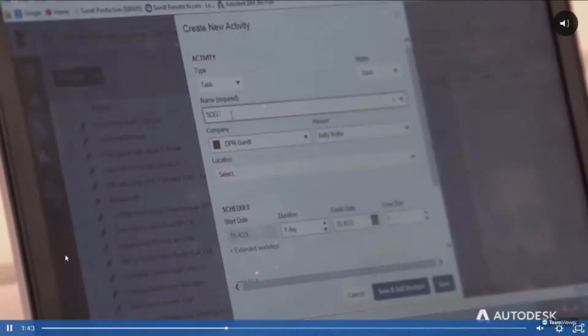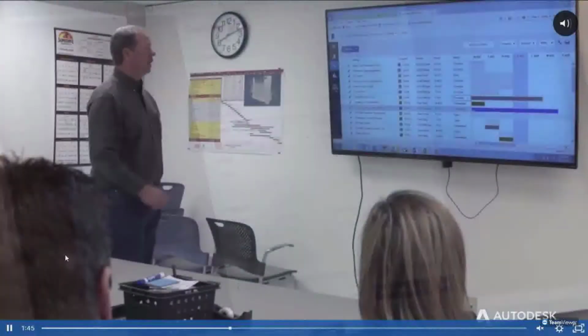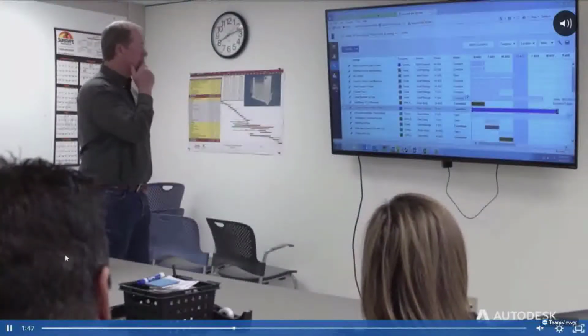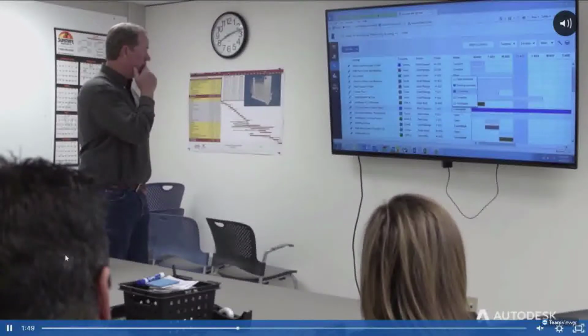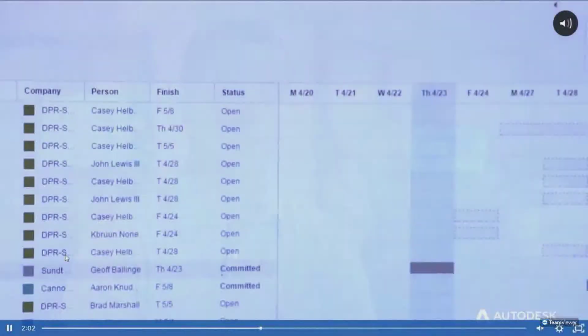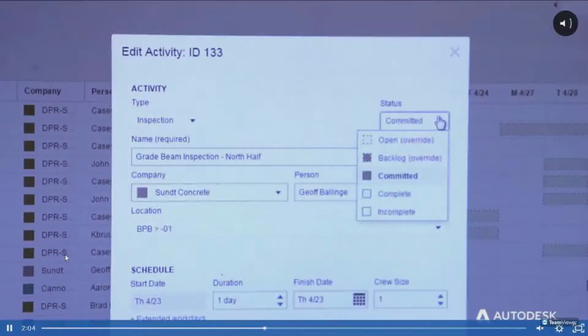Because for a contractor, if a contractor comes on site with his entire team there, he's got 5, 10 people, maybe more, and now he has to wait for something. That means that he's got to take that cost on himself because he's paying his workers per hour, and you wouldn't want that to happen. If you do that as a project manager, then you will get a very bad reputation in a very short amount of time. So we wouldn't like to be in that situation.